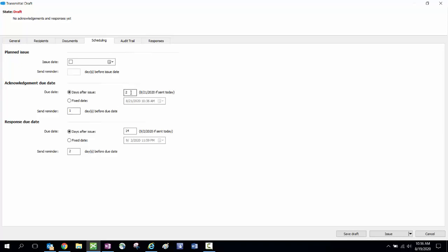Now remember that these are calendar days, not business days. Therefore, if you send this package on a Friday and they have 2 days to acknowledge it, they would have to acknowledge it before Sunday. So just keep that in mind as you're building your package and setting your dates.